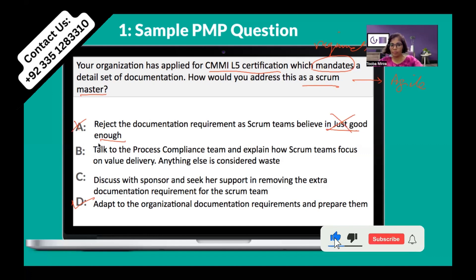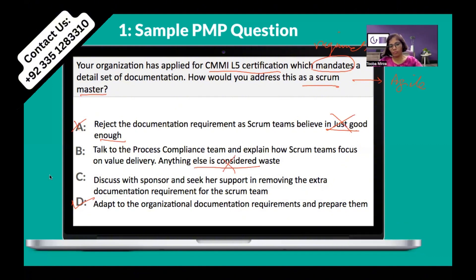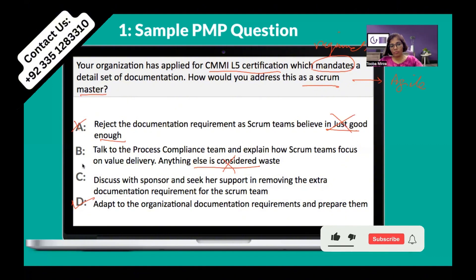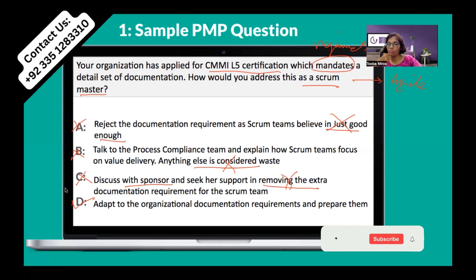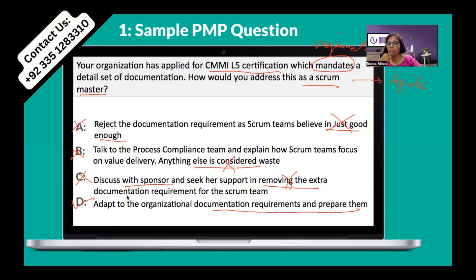Option B says talk to the process compliance team and explain how the scrum team focuses on value delivery and anything else is considered waste. But a scrum team cannot decide themselves whether the documentation part is waste — so option B is also rejected. Option C says discuss with the sponsor and seek her support in removing the extra documentation requirement. Since the question says it's a certification requirement and everything is mandatory, we cannot ask to remove it. So the last option, D — adopt the organization's documentation requirements and prepare them — is the right answer.